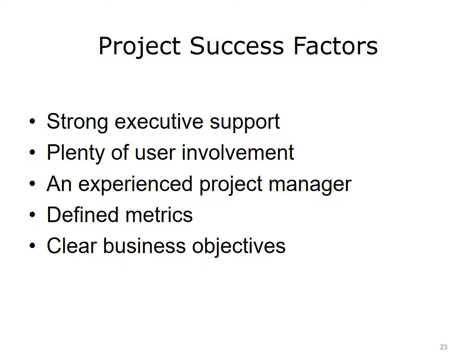A profitable undertaking often depends on an experienced project manager, especially in a highly specialized field like health IT. Their background and familiarity with the demands of the specific environment and its users can help a project reach successful completion. For instance, an experienced project manager will take a clinical provider's hectic schedule into account when planning meetings or requesting feedback. Unlike the fairly predictable schedule of a business environment, the demands on a clinician's time can be irregular and urgent. To accommodate the changing schedules of these stakeholders, meetings must be short, efficient, goal-oriented, and above all, flexible.